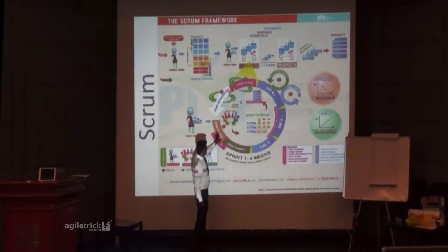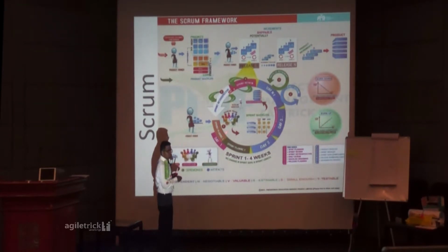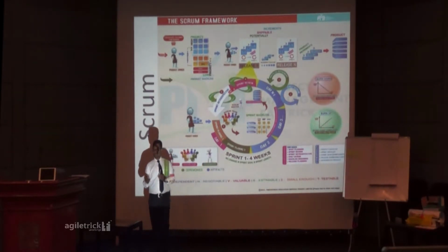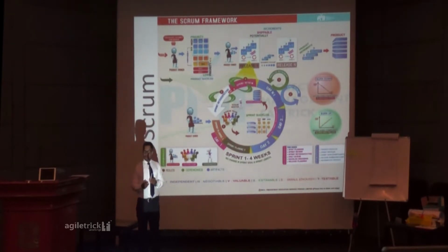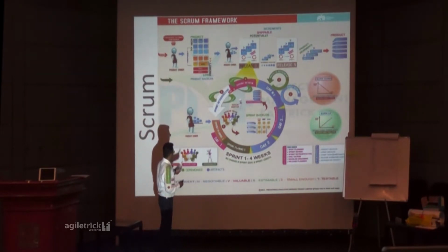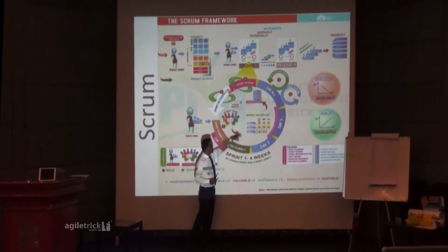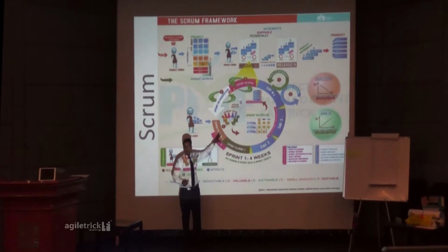Sprint planning meetings 1 and 2 happen on day 1. Now let us discuss what happens in sprint planning meeting 1, on the starting day of the sprint. The product owner takes the leadership and explains all high-prioritized user stories and business logic to the team.